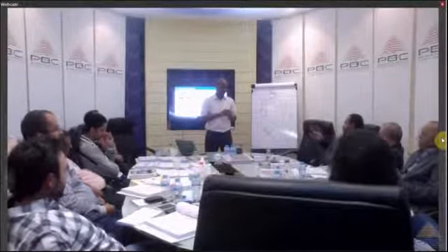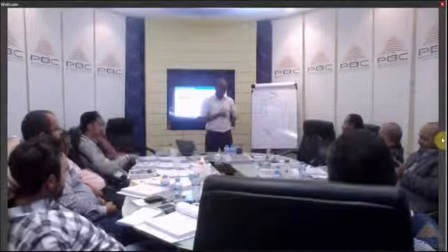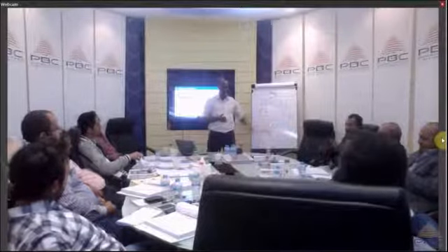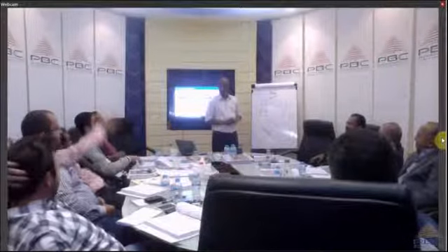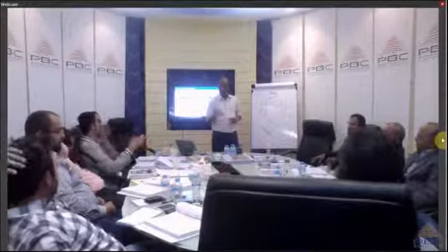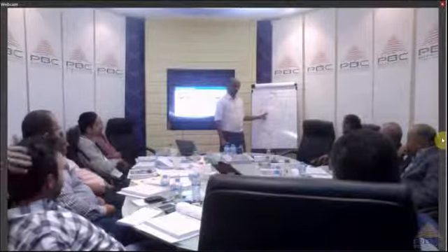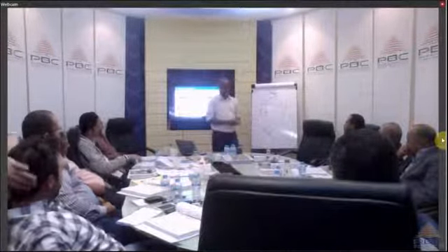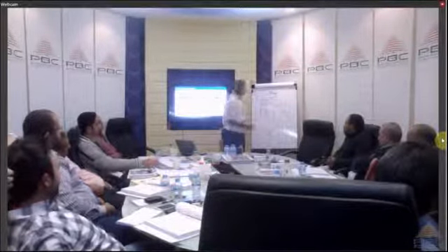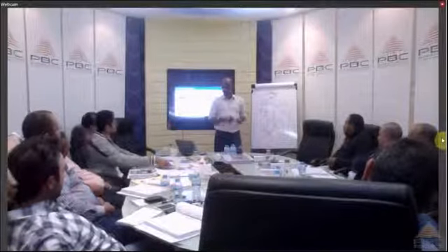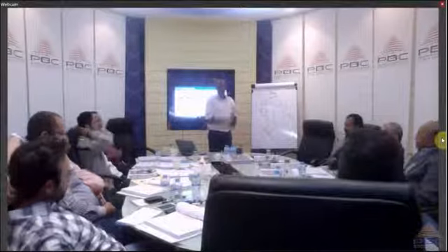Good. Make work like this in less time. Does it involve more cash? We get more income. Why does this involve more cash? Cash flow will be more. Production will be more, and so will resources. Exactly. If I need one painter to paint two different rooms, but I want to be working on two rooms at the same time, I need one painter here and one there, so extra resources. So that's why it involves more money. Extra resources, but less duration.